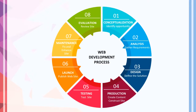The web development process has eight stages: first, conceptualization; second, analysis — to gather requirements; third, design — to define the solutions; fourth, production — to create content and construct the website; fifth, testing the site; sixth, launch and publish the website; seventh, maintenance — to fix or enhance the website; and eighth, evaluation — to review the website.